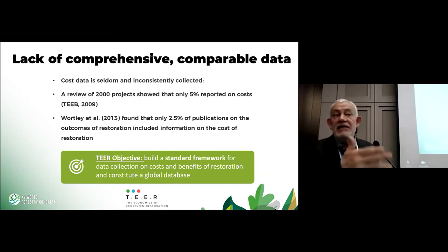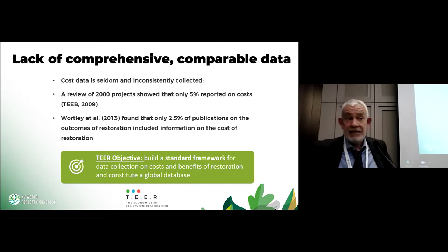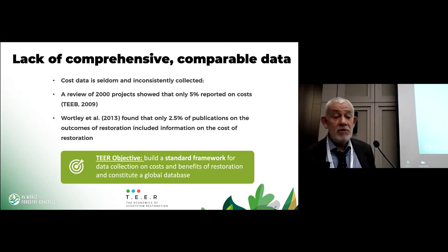In addition, there is also the need to be able to compare projects. For a big public investor, where do I put the money? Where is the best cost-benefit ratio? And as Christophe has said, the problem is that cost data is seldom and inconsistently collected in projects. It's absolutely not systematic, and it's done in very different ways. A review in 2009 of 2,000 projects showed that only 5% reported costs. Another estimation was that around 2.5% of scientific publications included information on cost, not even talking about benefit. Next slide, please.